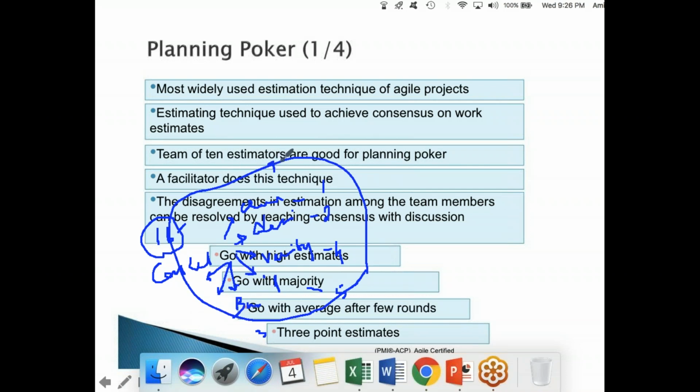We call them tasks. Typically, these are the activities, actions that are required to produce this deliverable called cancel booking. Till that time, they don't do it in hours. They just estimate the story points, right? And now, how many people are there? How much ideal time is there? Ideal time is nothing but the productive time. You will have daily meetings, you'll have emails, clerical jobs. You remove those, and on technical work, how much time are you going to spend? They take that, right? And accordingly, the team will choose: Okay, I can do add to cart, I can do payment gateway, I can do cancel booking.